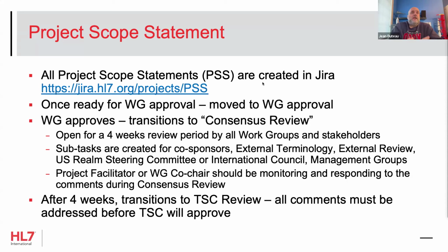But if you've seen it already and it's in the pharmacy space and you're CQI, you don't need to comment on the pharmacy project scope statement because you already said in the proposal that you weren't interested. So once the work group approves it, it has a minimum 4-week review period. So all of the other co-sponsors need to come in and review. So again, this is where the project team needs to start circulating that, right? It just doesn't sit there.